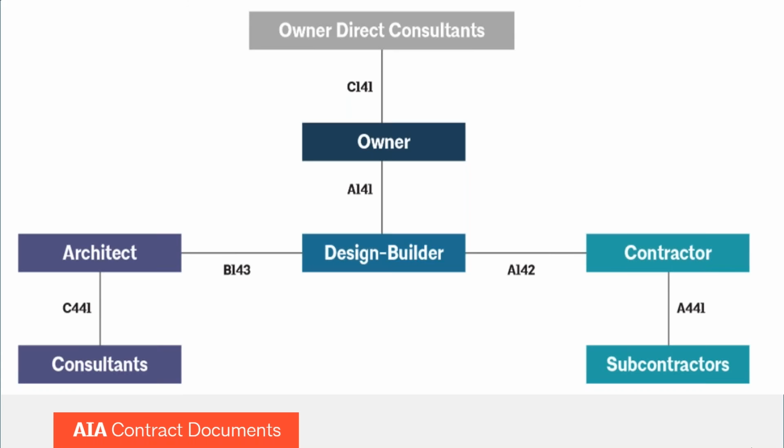And really, we've been focusing a lot on the design professionals' risks with that lack of design in the early setting of the contract sum and GMP, but really all the parties are set up to a certain amount of risk. The earlier you set the contract sum, as Donovan liked to say, the longer the runway is between when the contract sum is set and when the design is complete, everybody is exposed to more risk. And most of the disputes arise during that period of time, trying to work out who is responsible for the various changes that were necessary to achieve the owner's goals on the project, for their budget, for their schedule, and things like that.